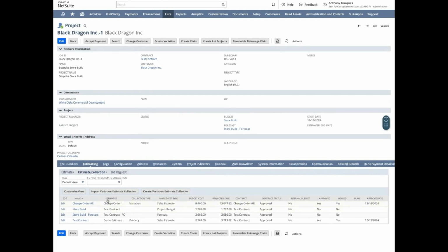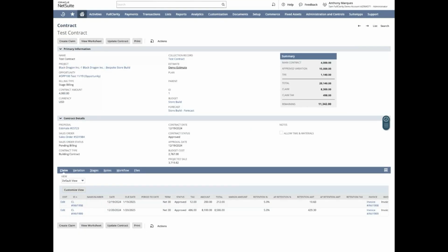Like I mentioned earlier, you go into estimate collection, and that's really where you group all the estimates into a package to create the budget. And then together with the contract pricing, so we have all our cost estimates in place, we then have our pricing elements. We make up a contract. So estimates all get wrapped up and create a contract.